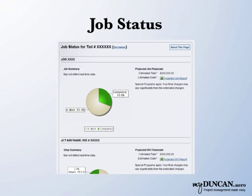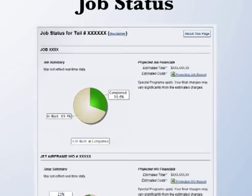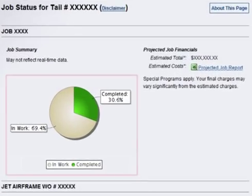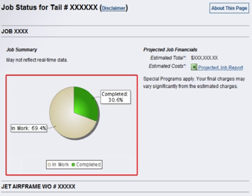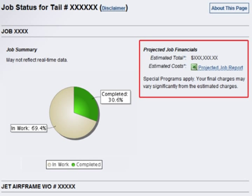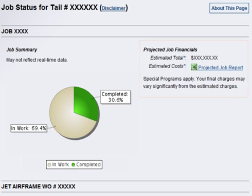A job's current standing is represented by charts and projected financials. Charts indicate the number of hours for items that are in work and completed status. Projected financials represent a general cost estimate for a job or work order, with more financial details available for download in an Excel file.